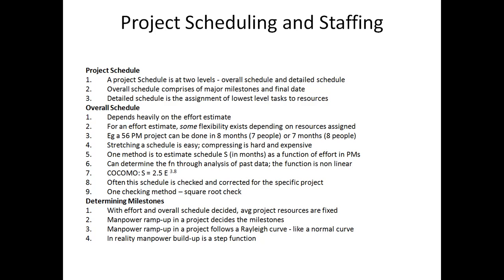For example, the detailed design phase can be broken into tasks for developing the detailed design for each module, review of each detailed design, fixing of defects found, like that. So these sub-activities can be planned for. For each detailed task, the project manager estimates the time required to complete it and assigns suitable resources so that the overall schedule is achieved.